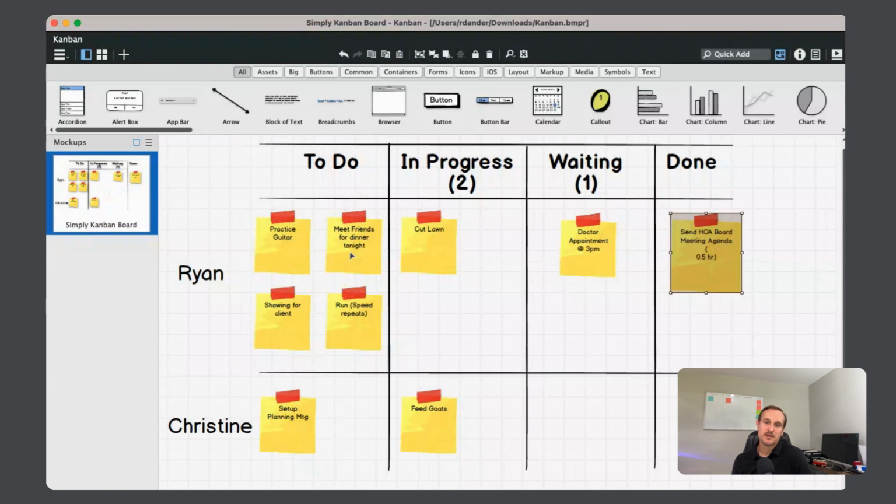Cycle time's more for the team. It's more for you, a personal metric for your own tasks. Lead time is more to assess how long it takes to get something back to a client, customer, or completion based on when they made that request. And then they can better plan timelines and roadmaps and things like that.